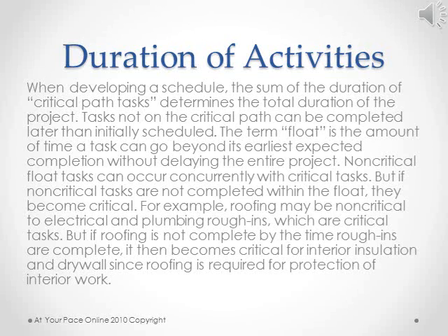Tasks not on the critical path can be completed later than initially scheduled. The term float is the amount of time a task can go beyond its earliest expected completion without delaying the entire project. Non-critical float tasks can occur concurrently with critical tasks, but if non-critical tasks are not completed within the float, they become critical. For example, roofing may be non-critical to electrical and plumbing rough-ins, which are critical tasks. But if roofing is not complete by the time rough-ins are complete, it then becomes critical for the interior insulation and drywall, since roofing is required for protection of interior work.